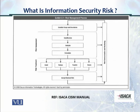After completing the identification and analysis for each risk — say there are 20 risks — you move on to the next stage: evaluation of the risks. Evaluation means looking collectively at all the risks, prioritizing them, and assessing how much they will cost, what resources are needed, and what resources are available.